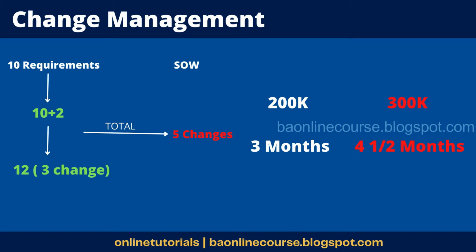Now when either one happens, make sure that you ask the customer to send you a formal request. Most of the times these requests would come in, the customer comes over to you or calls up and then says, can you make that small change? And then you say, okay. So that is where a lot of problems comes in.